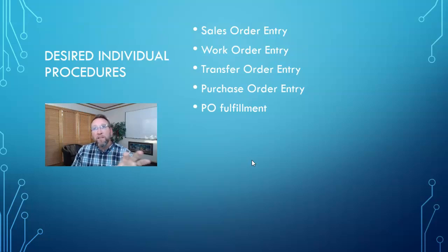So using those numbers as a measuring stick to size up your company and size up the project, if you're on the higher end of that, then the individual procedures become worth the time and effort to assure a successful implementation. If you're under 10 million or under 5 million or under 5 users, then we might be able to get away without doing the individual procedures and only doing the overall workflow document.